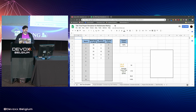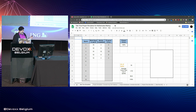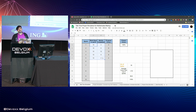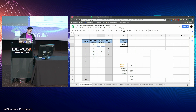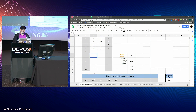I'm using a spreadsheet developed by Adrian Fittolani, who has made a very interesting talk available on InfoQ named 'How to Use Monte Carlo to Forecast Delivery Dates.' This is a fork of the original spreadsheet. You can see here the history of the throughput of a team. For each sprint, we set the number of tasks we were able to complete — four tasks for the first sprint, six for the second, and so on. The tool then computes the average cycle time for each sprint.